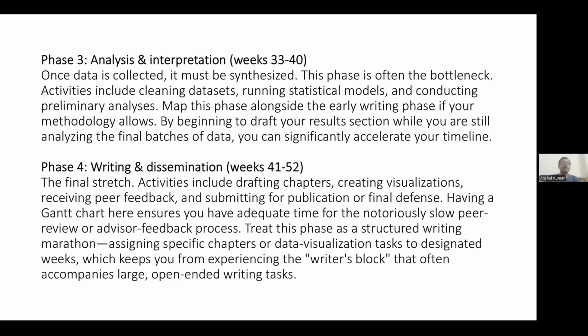Analysis and interpretation, from week 33 to 48. Once data is collected, it must be synthesized. This phase is often the bottleneck. Activities include cleaning data sets, running statistical models, and conducting preliminary analysis. Map this phase alongside the early writing phase if our methodology allows.